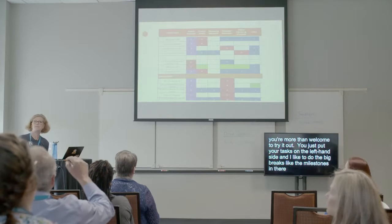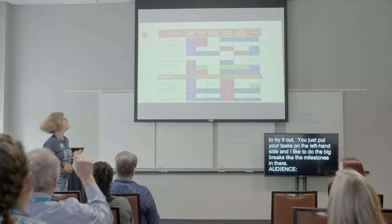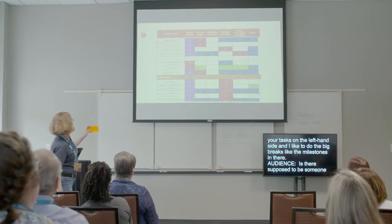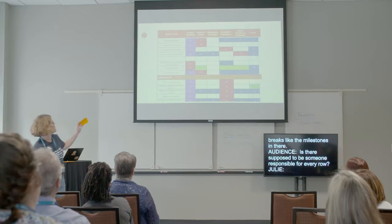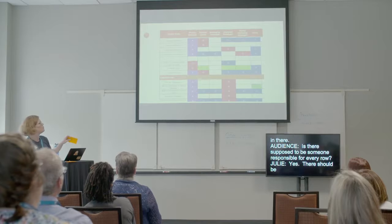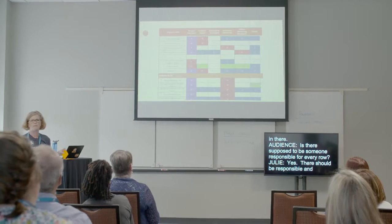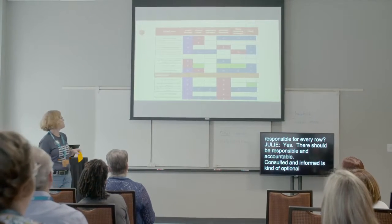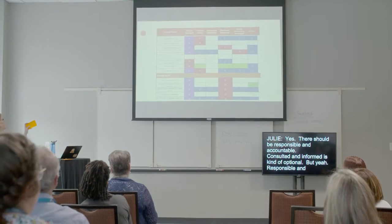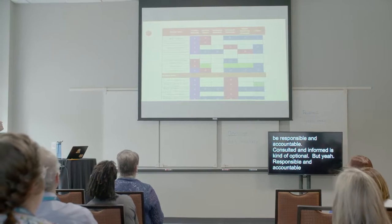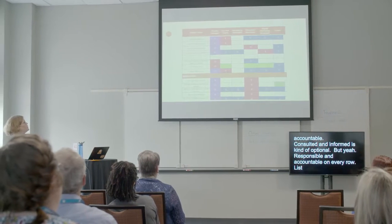Can I ask a question? Sure. Is there supposed to be someone responsible for every row and accountable? Yeah. And then this was, there was a whole bunch on the client side. So yes, there should be a responsible and accountable. Consulted and informed is kind of optional. But yeah, responsible and accountable on every row.